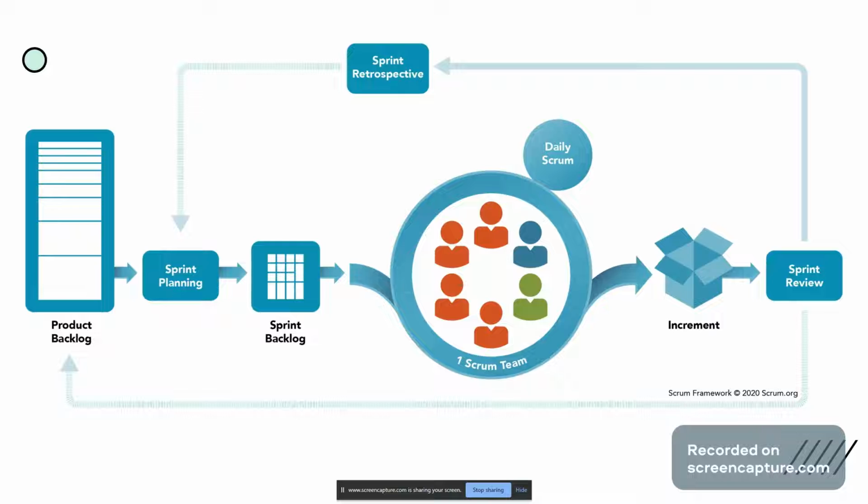So Scrum is broken down into five ceremonies, and every team fits those ceremonies into sprints. Sprints are intervals of work, and that's how we schedule our ceremonies. Sprints are generally 2 to 4 weeks, and a lot of companies like two. Two is really the magic number. Anything above four is too long, which is one of the issues with Kanban that we'll talk about later. Too short, you don't have time to iterate and create new work. So 2 weeks, golden rule.